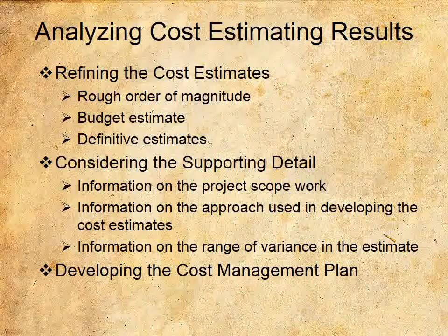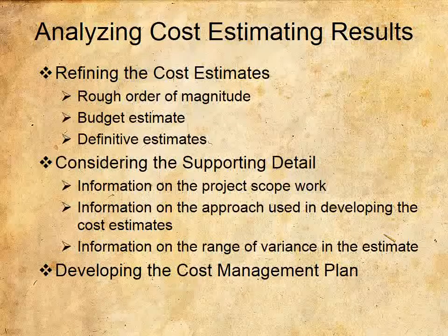The performing organization may have policies and procedures on the expected reactions to cost variances within the project. For example, variances over a set dollar amount may prompt the project manager to create a variance report, meet with management, or even initiate an audit.